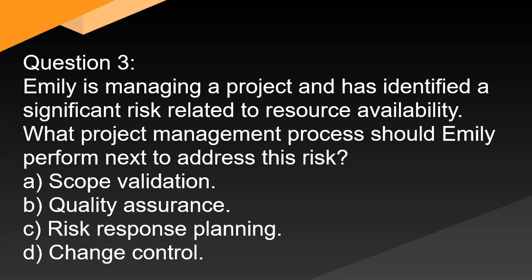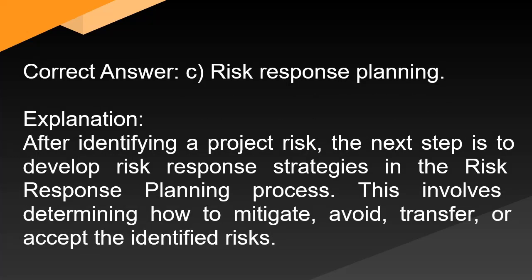Question 3 [partial]: After identifying a project risk, what project management process should be performed next to address this risk? A. Scope validation. B. Quality assurance. C. Risk response planning. D. Change control. Correct answer: C. Risk response planning. Explanation: After identifying a project risk, the next step is to develop risk response strategies — determining how to mitigate, avoid, transfer, or accept the identified risks.